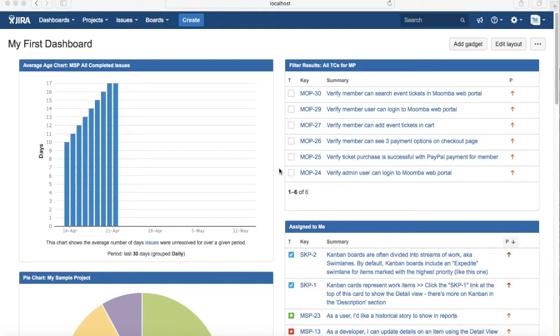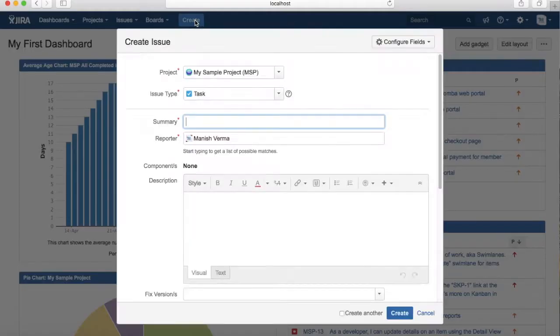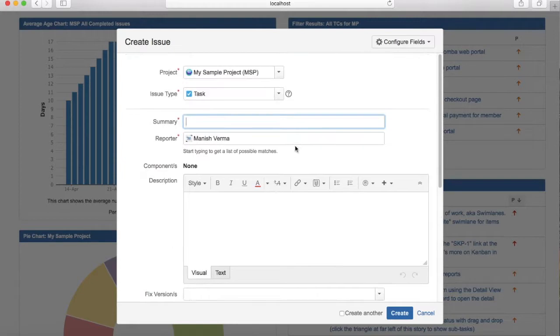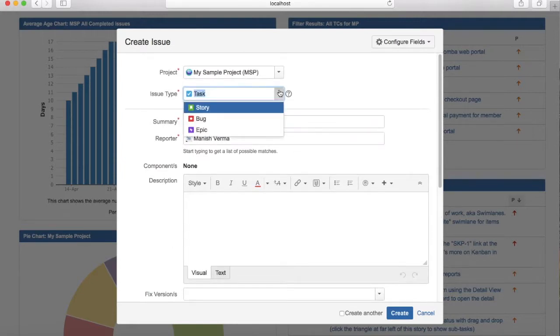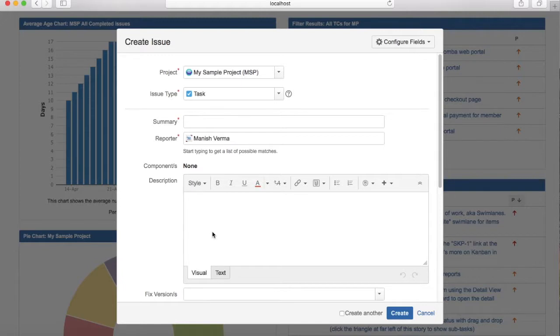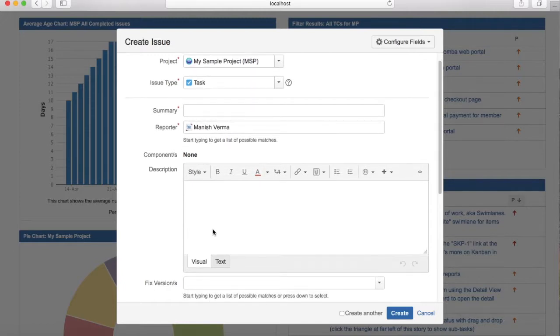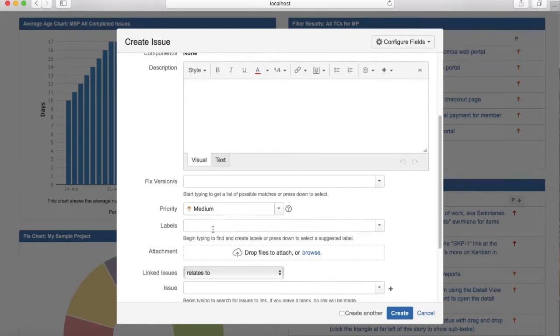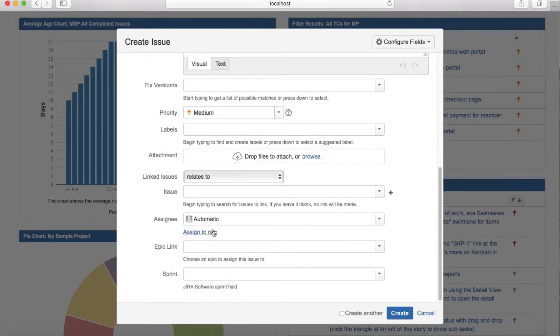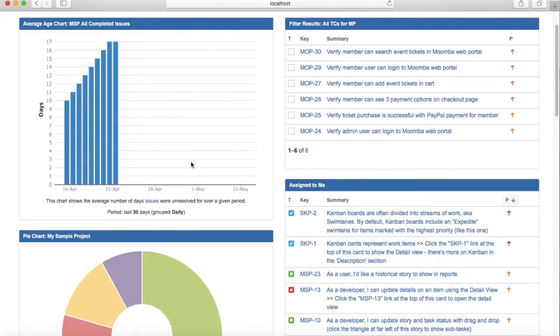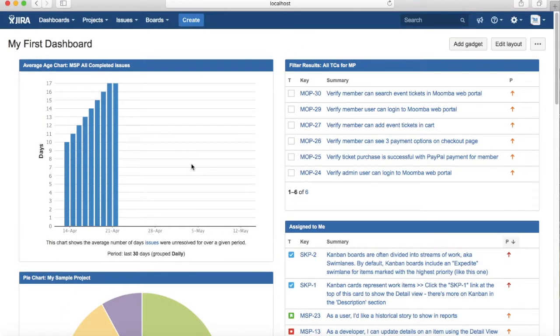In order to create tasks in JIRA software, you just need to click on the create button at the top and select issue type as task in the dropdown. Provide summary, description, and whatever details you want to put in the task, then click create. This will create an issue type as task in JIRA. Thank you.